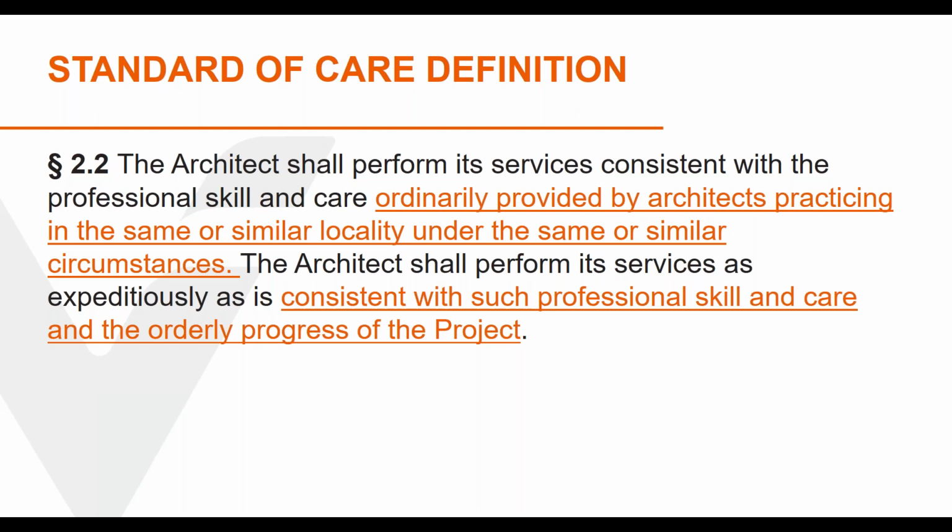And one argument is that a licensed design professional has to protect public safety by not forcing performance to an unreasonable schedule. And also be aware that this language protected firms during the COVID-19 situation because it really acts as a force majeure provision. There's no other such provision in an AIA contract. So delays caused by COVID restrictions were seen as excusable.